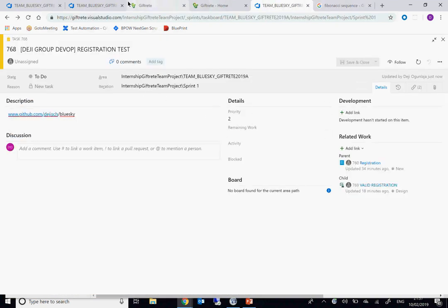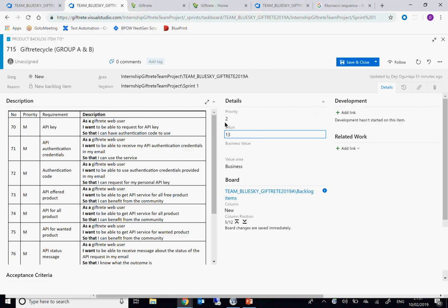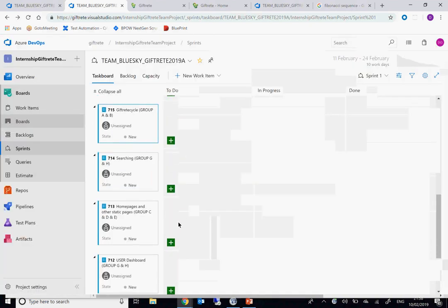So why did they use that? There's no point saying how long or what's the effort of this story. And someone said it is 1. Another person says it's 2. Another person says it's 3. And another person says it's 4. So it's okay when they are close. 1, 2, 3. It's fine. And they now say there's no reason why you should say 4. You can as well just move to 5. So after 5, there's no 6 or 7. The next one is 8. Because if it's that big, you just move to 8 from 5. So then after 8 is 13. So that's the concept actually, in terms of estimation.